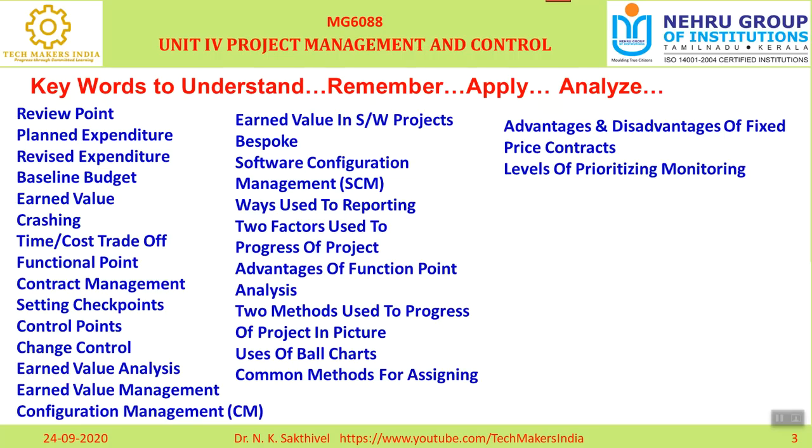First, we monitor whether the activity is critical or not. If critical, a certain methodology can be included to monitor. Non-critical means a certain level of observation. And high risk activities: whenever our software is executing high risk activities, we want to focus much. For example, real-time projects, flight simulators, autopilot simulators are high risk activities.